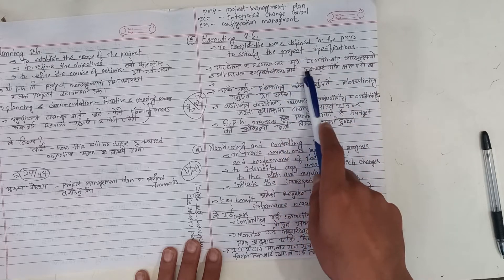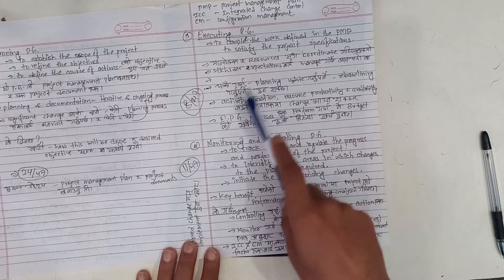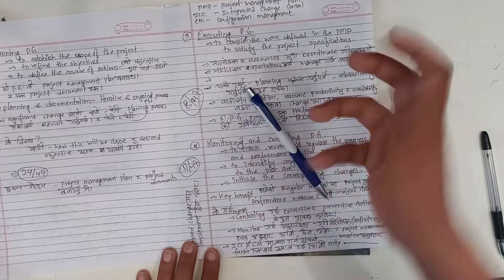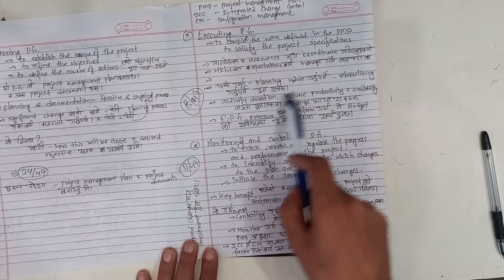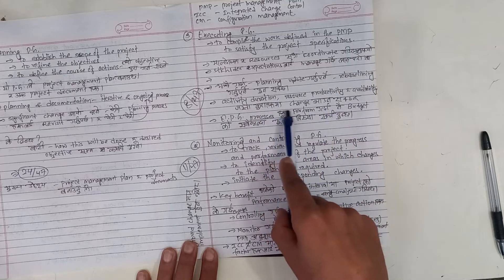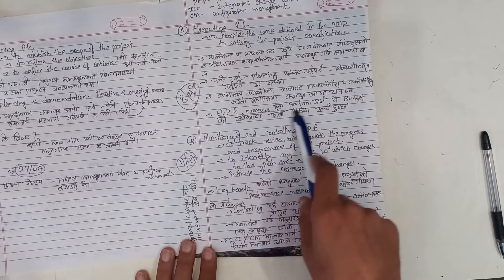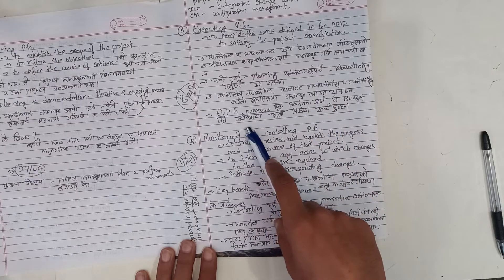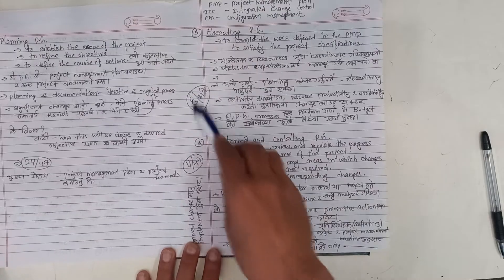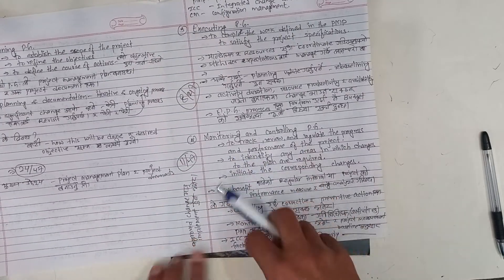During execution, planning updates and reassessments may be required, as activity duration, resource productivity, availability, and data can change. Executing process group processes typically incur the highest budget expenditure. The transition to monitoring and controlling process group begins here.